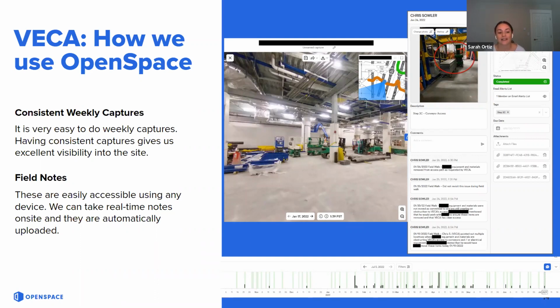And as electrical installers on a conveyor project, we're responsible for any work going into the power and controls for each of these conveyor beds. We're really reliant upon the sub who installs the physical conveyor bed and any platforms to access it, because if there's no conveyor installed yet, we can't do our electrical install work. So it's a little glimpse into our work, but I hope that it gives a little background so that you can see the importance of staying on top of all these issues, really big or small, that might be holding us up in completing our work.